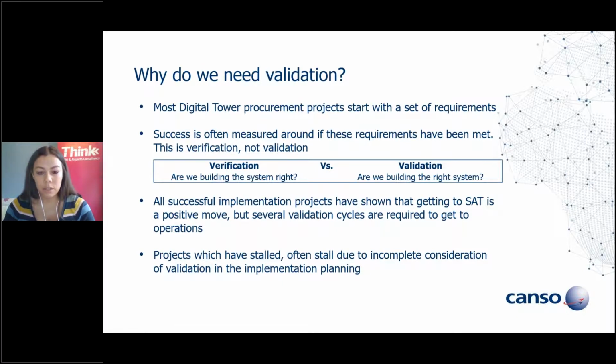So verification might be the remote tower has this function or this button, it supports this many airports, whereas validation is, is it acceptable to the user, is it safe? So all obviously site acceptance tests and testing is an important part of the process, but several validation cycles are needed in addition to get into operation successfully. And projects have often stalled by not incorporating a validation process into implementation planning. Next slide, please.